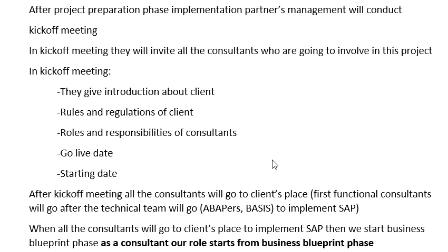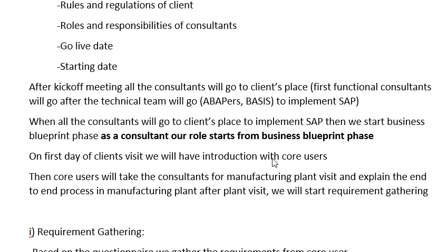In the kickoff meeting, generally they will give an introduction about the client and the rules and regulations of the client. They will discuss the roles and responsibilities of consultants, the go live date, and the starting date. After the kickoff meeting, all the consultants will go to the client's place. First the functional consultants will go, and then the technical team, meaning developers and basis, to implement SAP.